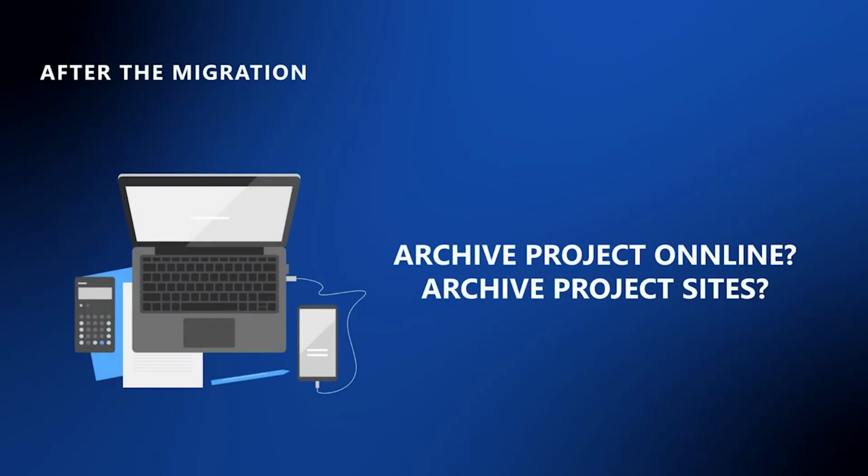Other things to consider are, of course, what happens after the migration. What do we do with Project Online? What do we do with project sites? There are many different opinions here, but our recommendation, and what we see the most, is that you keep the Project Online site in place, but you remove all licenses and permissions from the Project Online site so people don't accidentally access it.